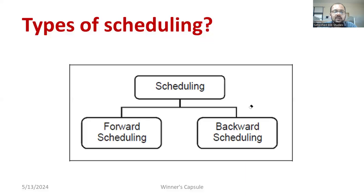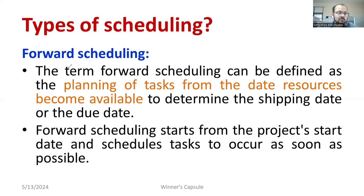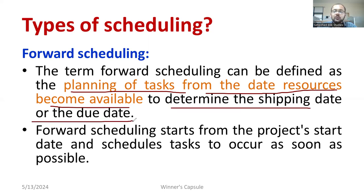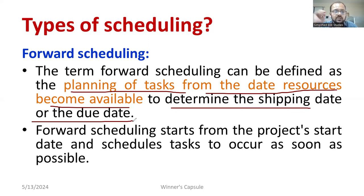The same concept of forward and reverse engineering can be applied here in scheduling. Forward scheduling can be defined as the planning of tasks from the date resources become available to determine the shipping date or due date. We require raw materials, machines, men, etc. to start a project. When all the material is available, you count that date and determine when you can finish and deliver the product. That is called forward scheduling.